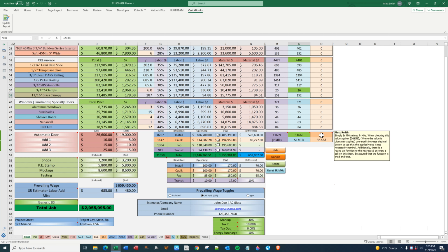So that extra 6, in this case 6.2, is being put into here according to the open shop install price, and here according to the prevailing wage if the alt add is chosen. I don't want to get into that, but the point I'm making is this needs to be put back in to the items, or else the SOV just will be that much off.